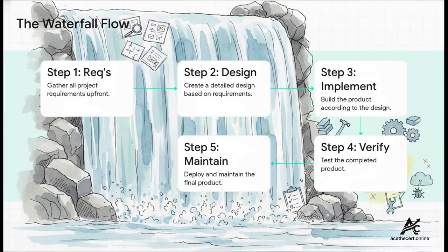But here's the catch. What happens if you finish the entire project and then realize a requirement from 6 months ago was, well, wrong? Trying to change something is like trying to make that waterfall flow back uphill. It's incredibly difficult and really expensive.